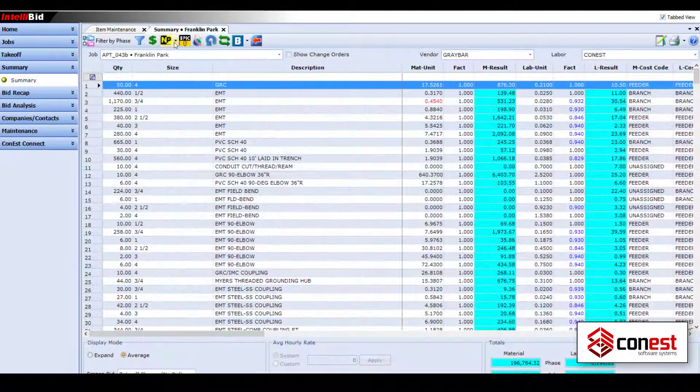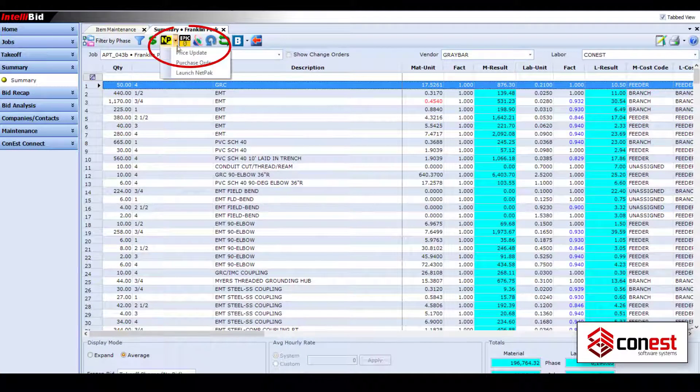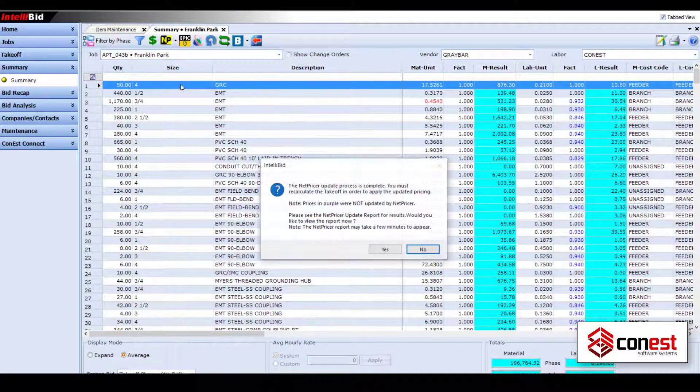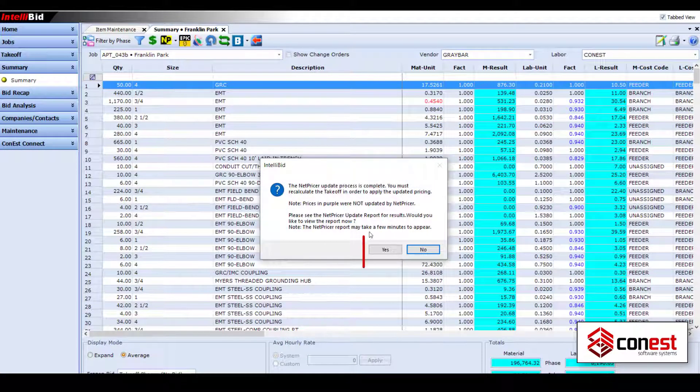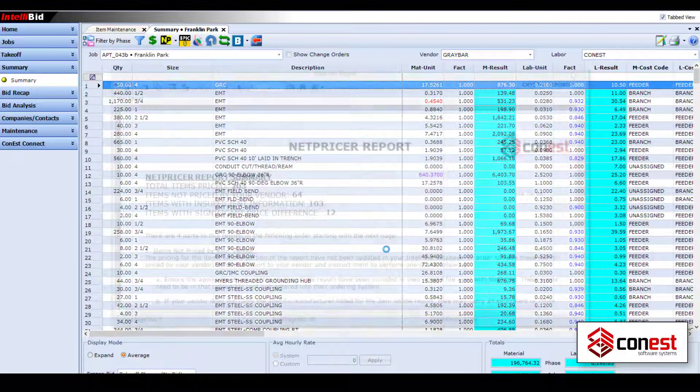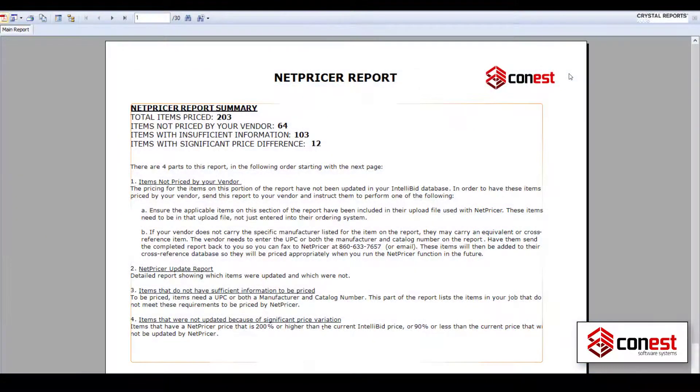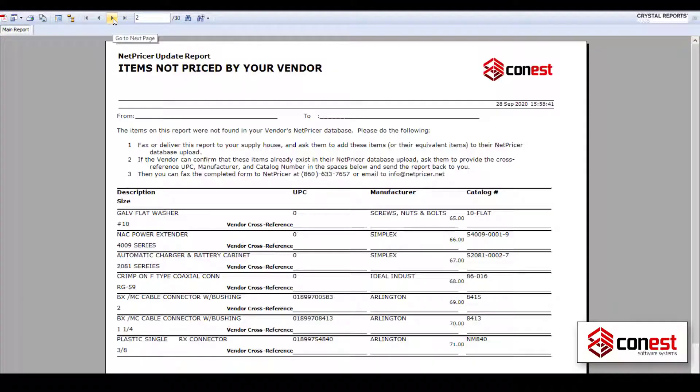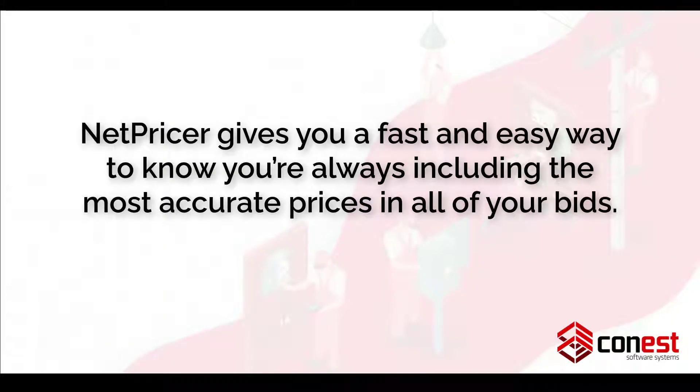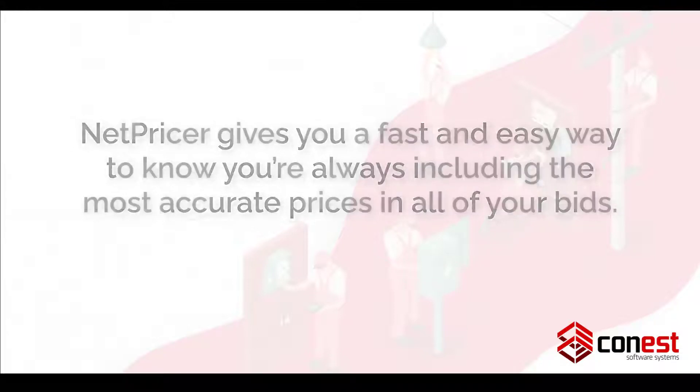Then run the NetPricer Update from the Summary tab of any job to retrieve the latest prices for all the items you have in your takeoff. Run the NetPricer Update report to see what items were changed and which weren't. IntelliBid's NetPricer gives you a fast and easy way to know you've always included the most accurate prices in all of your bids.